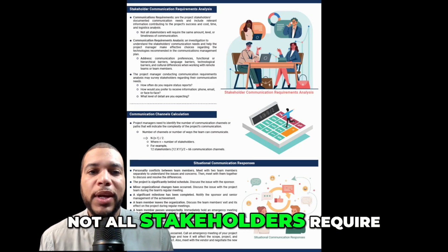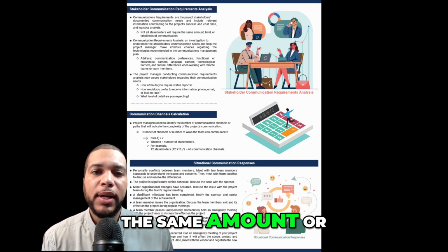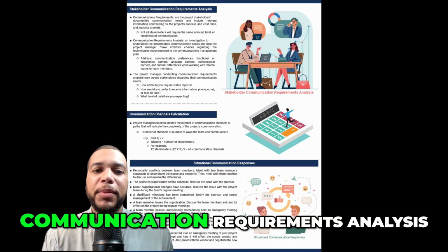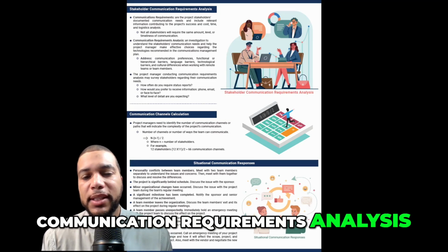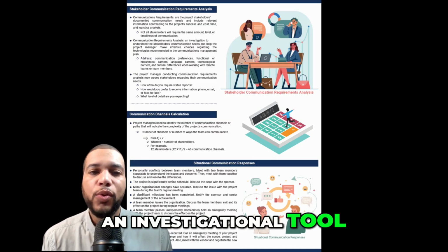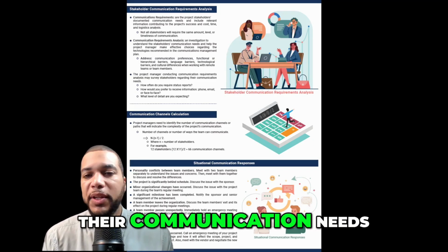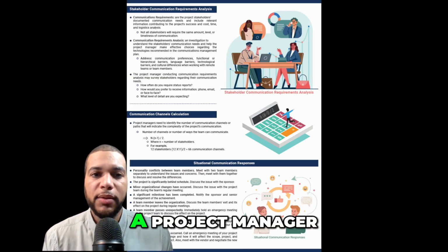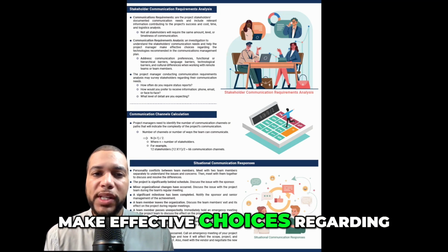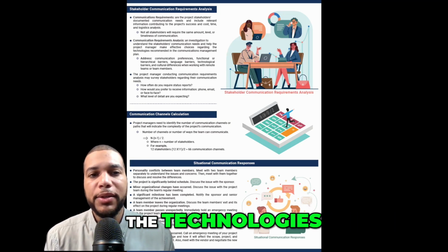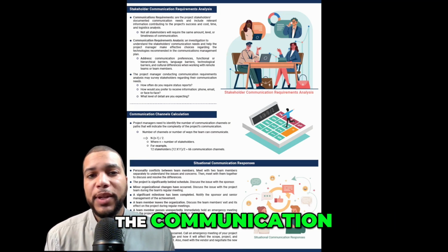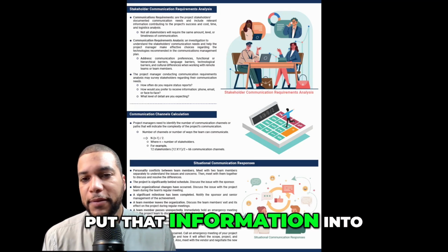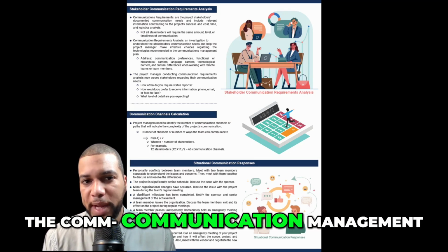Not all stakeholders require the same amount or level or timeliness of communication. You're going to do communication requirements analysis as an investigational tool to understand their communication needs. And this will help you as a project manager make effective choices regarding the technologies and recommend the communication management plan. Put that information into the communication management plan.